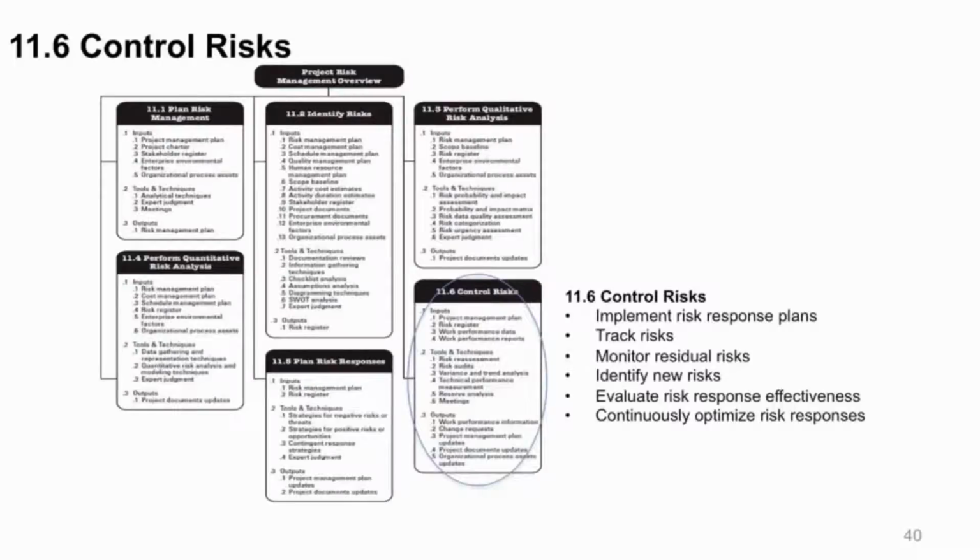So down here we see what it's all about again: implementing the response plan, making that call, say implement plan B for risk 8.3.9. Okay, and you track all your risks like that. You monitor the residual risk once your response is over with. Again, residual risks are new risks that emerge because of what you did to respond to a risk, and maybe identify the new risk there.